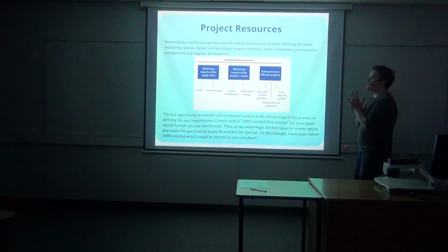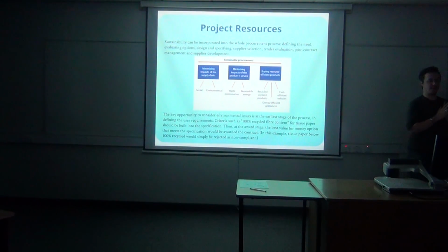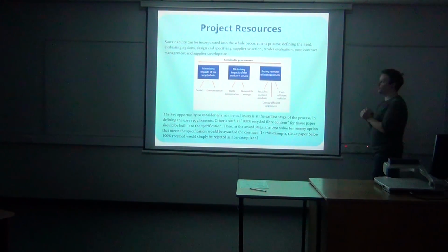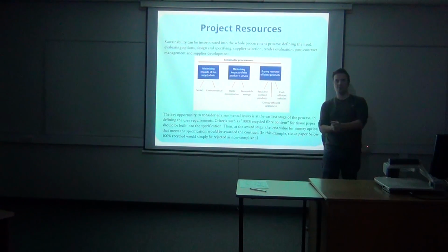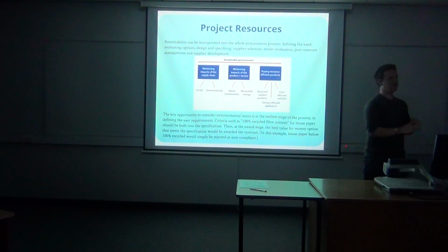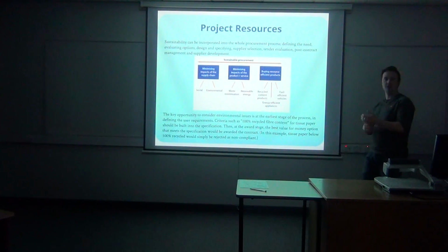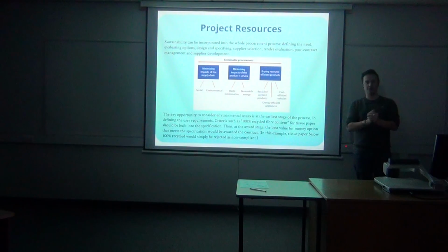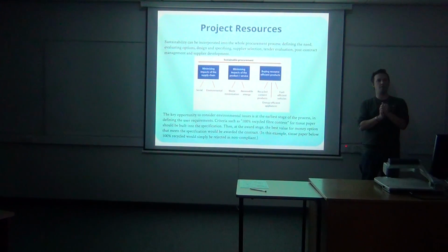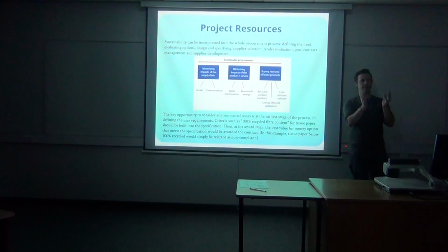So sustainability can be built into the whole procurement process: defining the need, evaluating options, designing, specifying, tender evaluation, contract management, supply development. And quite often now, if you're working for a company that goes to tender for a project or tender for a particular service, you'll have something called pre-qualification questions, PQQs. You'll have a little form to fill in that says, tell us about your company to make sure that you meet with our organisational norms.